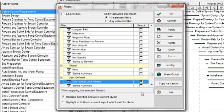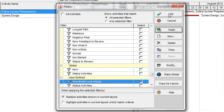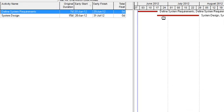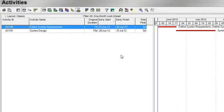Click OK and the dialog box automatically closes. Now we want to apply this filter to the project. Make sure the box is checked for the new filter One Month Look Ahead, then click Apply and OK. You will now see only the activities that are scheduled to start within the next month of the data date. This filter can be very useful for intermediate planning as it looks at only activities that are to start within the near future.